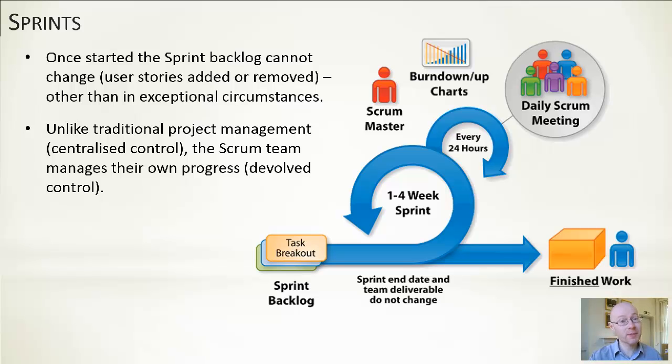The Scrum Master helps here in terms of coordination. The daily Scrum meetings help in terms of sequencing. The burn down chart again helps. The burn down chart is a way of either ticking off what it is you've done, or burn up, measuring your progress towards the end. So you have things like velocity. You can track if you are on target, and if you're not, you can take action to hopefully help correct whatever issues you're dealing with.